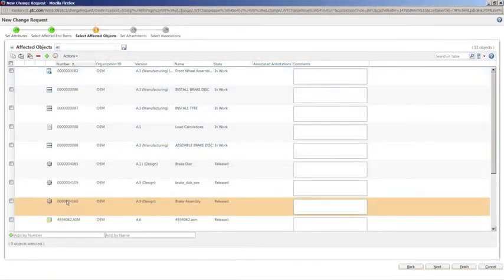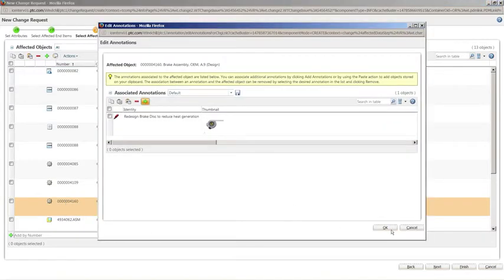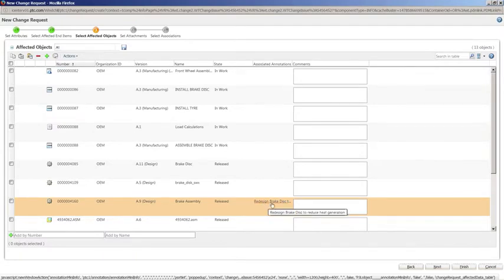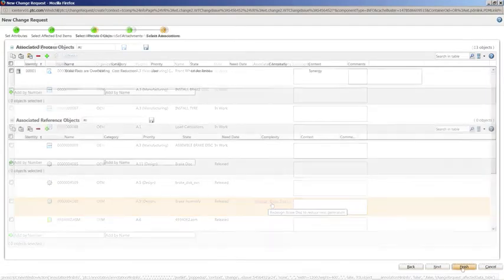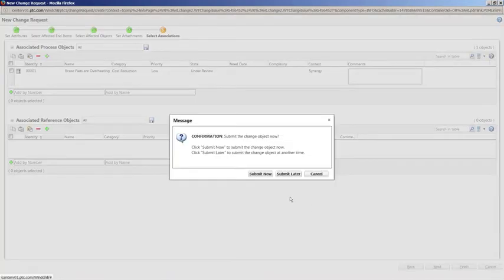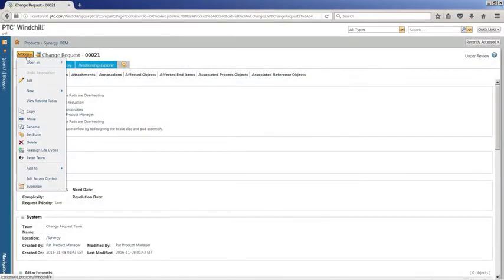Since Windchill includes traceable links between parts and all required data, such as drawings, models, analysis, etc., it is easy to collect the related data that will also have to be updated in order to implement the change. The change request is sent out for review,